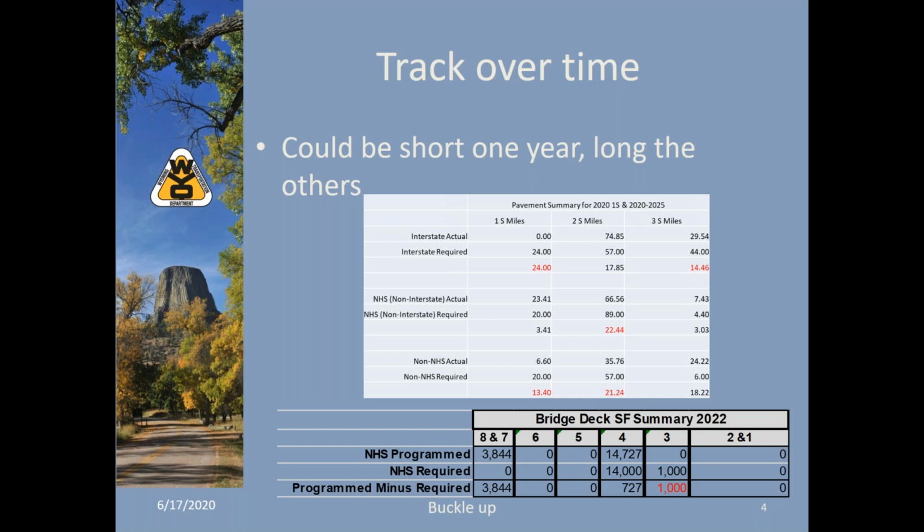One of the key things to note here is that since we've integrated this, we're using it to feed our annual consistency review. Our consistency review is currently being reviewed by FHWA for this year. We pull this data directly out of our STIP. We also use it to review our TAMP and do an analysis on that. Is it on course? We do a STIP analysis. Are we following our investment strategies? We're also using this for internal end-of-year reports and to really tie to performance management.